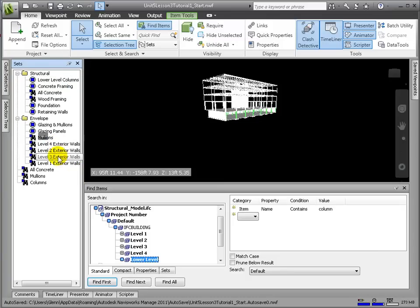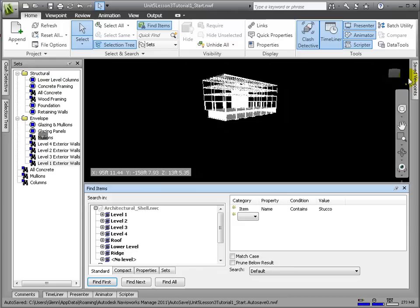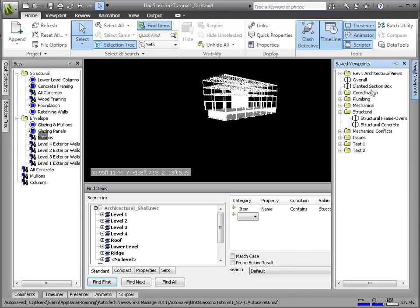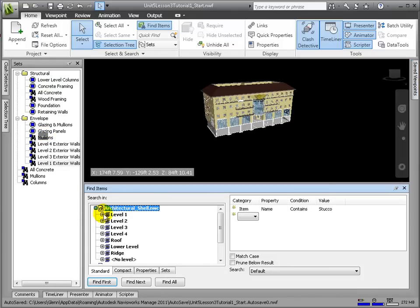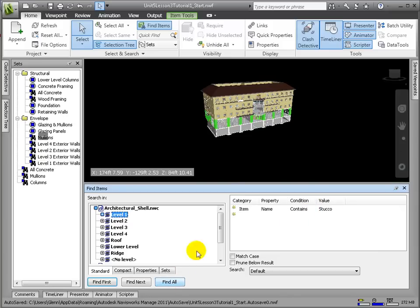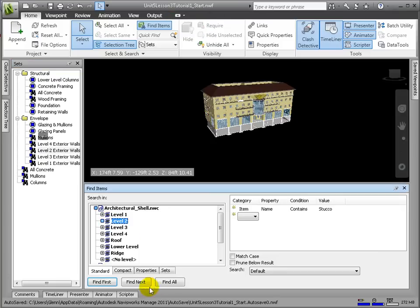We will now group the exterior walls by level. We have to perform the find items from within a scene view displaying the architectural shell. We can search on Stucco and from the level selected in the selection tree. Let's first try this for level 1, and we'll update this set. Now the exterior walls on level 2, etc.